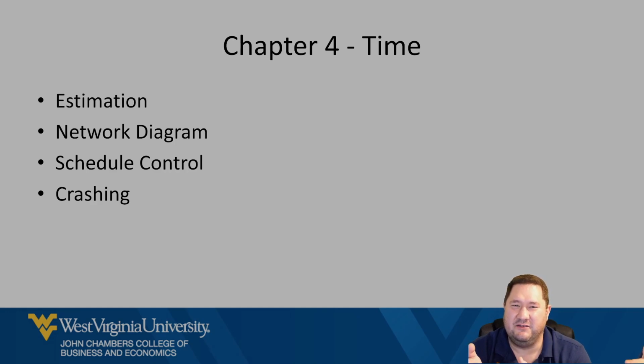Remember those lessons learned from that chapter 1 talk I was talking about? All that closing paperwork. You as a new project manager could take a look at that paperwork and see, they did the pediatrics department, so that was about the same size area, and it took them 6 weeks to do that. Well, now you have almost an apples to apples comparison. Hopefully that is something you can think about when you're doing a project. So that's chapter 4. So chapters 1 through 4 in a nutshell.